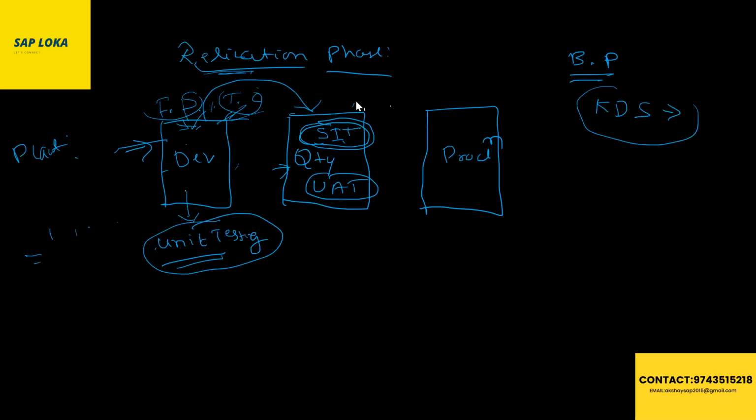Then once it is done, all the data will move to the production server. Here our end users will work on day-to-day activities. Once everything is done, testing and all, then the data will move here. Before testing, again here we will give a demo to our end users, to check whether all the data is correct or not. These people will verify, and if anything is wrong, we'll do the changes again. Many headaches will be there, because end users don't know. Whatever we are showing in the document or PPT, only then are they analyzing.